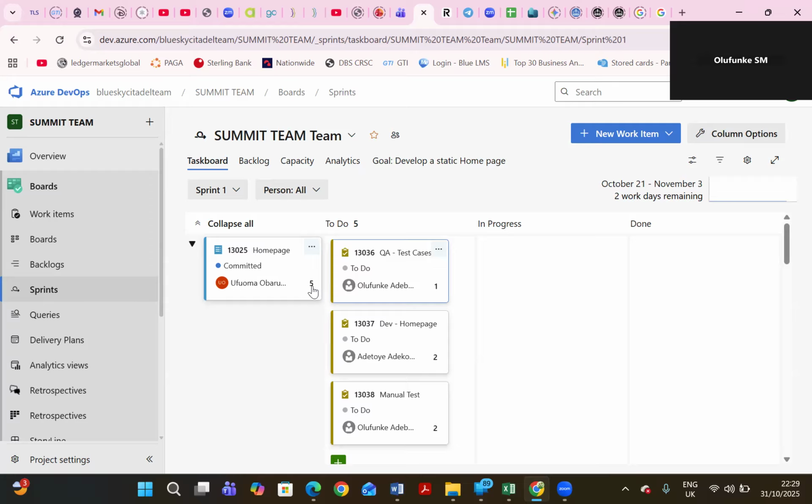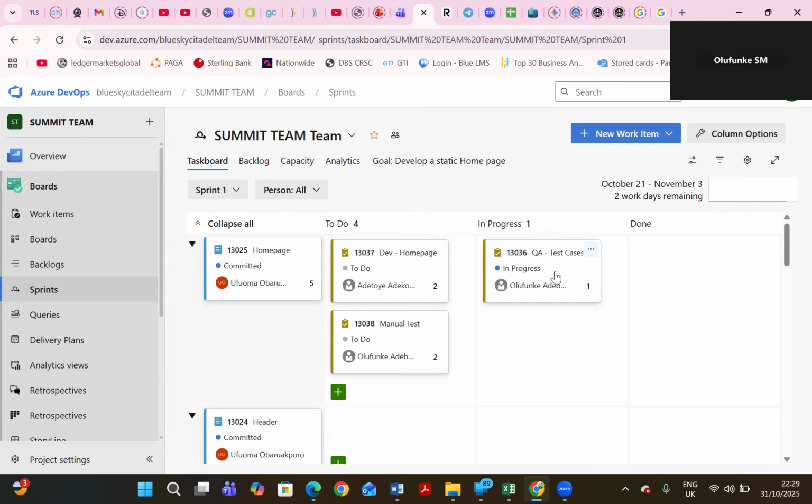Okay, so Funke, move any one of them, maybe your test case, to in progress. Let's see what will happen. So you've tried, you can see that it's now 4-1. What you said is my 1 hour is now in progress. I've started using my 1 hour. It's not in to do anymore. I'm using it now, and it has reduced from to do. You can see to do has become 4, and your 1 hour has started counting in progress.